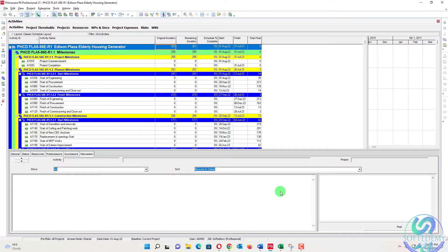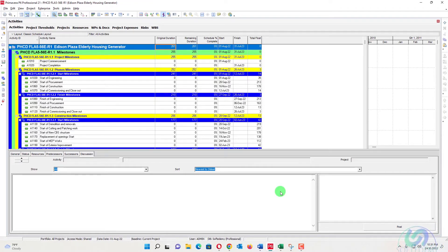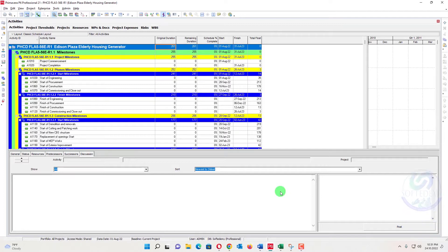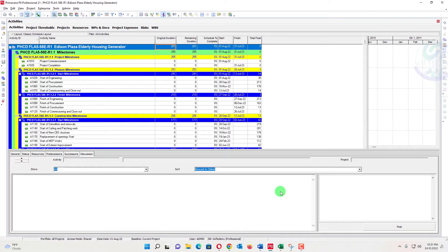Mostly clients ask why you don't show your contract duration on the top of the schedule. In Primavera P6, the schedule is based on working days because we assign a calendar with public holidays and weekends excluded. If we include weekends in our schedule, the start and finish dates will be wrong.